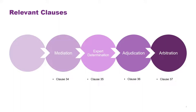Expert determination, adjudication, and arbitration — governed in Clauses 35 to 37 of PAM 2018 — are forms of what I would call determinative ADR, where a top-down decision is imposed on the parties. Mediation stands out as the odd one out because mediation does not involve a decision made for the parties; rather, it involves the mediator playing the role of a facilitator to assist the parties to come to an agreement.